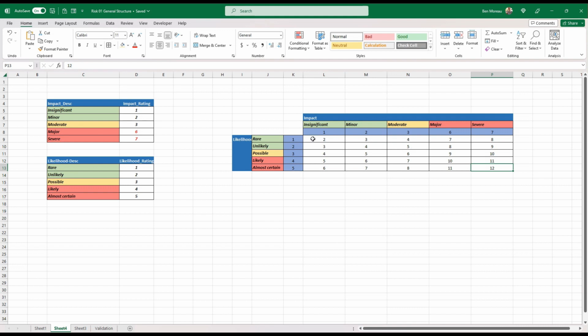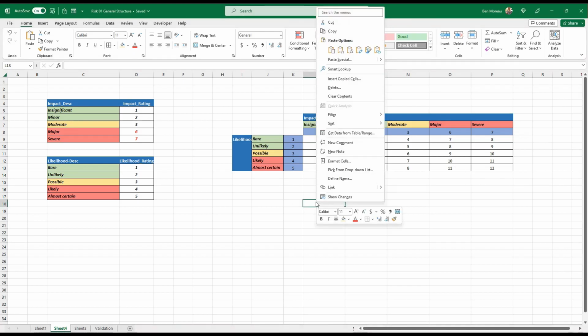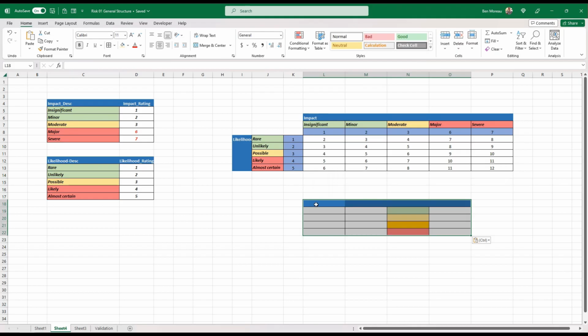So we have added all this. Every time we have a risk, we just add this rating plus this rating, and we come up with a number. As you can see, the severity itself will be between 2 and 12. So we have just one thing to do, which is to decide for which bracket how severe the risk is. So let's have a look at the table that I've created here. I didn't want to go through all the typing, that's why I've just created it, and I just have to paste it here for you.